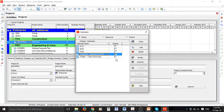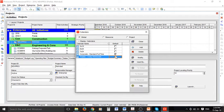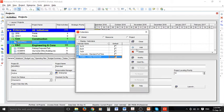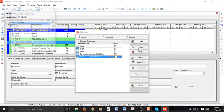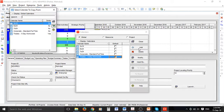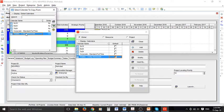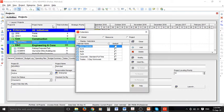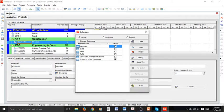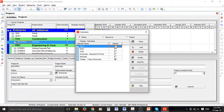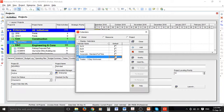You can choose the default calendar by checking this box or add a new calendar for your project. I want to select a five-day workweek for trades to copy from, and this is my new calendar. I can name it again Merdad and I want to make it a default calendar.